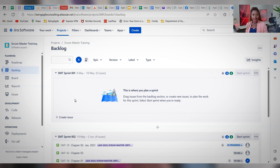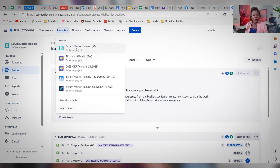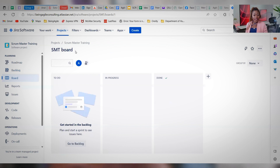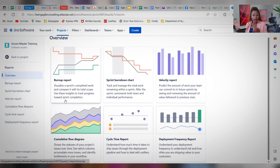I'm just going to quickly share my screen. So how do you reopen a closed sprint in JIRA? It's very simple. The first thing you want to do is to access your JIRA — this is a JIRA board right now. The very next thing you want to do is select the project. Come to this tab at the very top where it says Projects, click on it, and select whatever project you want to work on. Then on the left-hand side, select Reports. Once you select Reports, you will see the different reports that you have earlier configured. Select Sprint Burndown Chart.